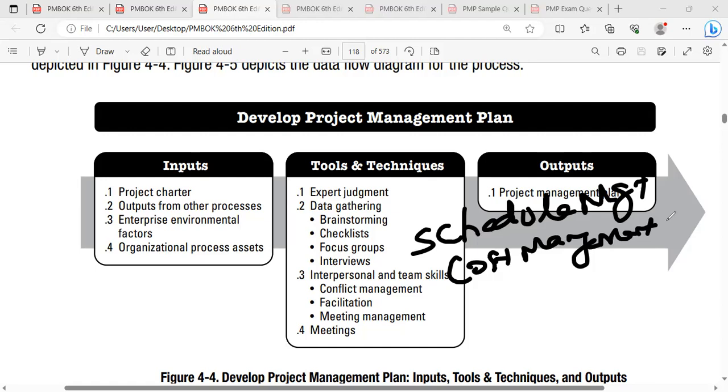It also says what level of detail they need to report through the template, which subject matter experts will be used, and what periodic information the process has to repeat or iterate. This information goes into the risk management plan. If you don't have the mother document for each knowledge area, you are not able to follow a proper guideline. Even adaptive projects, which receive changes very often, should have their own management plans.